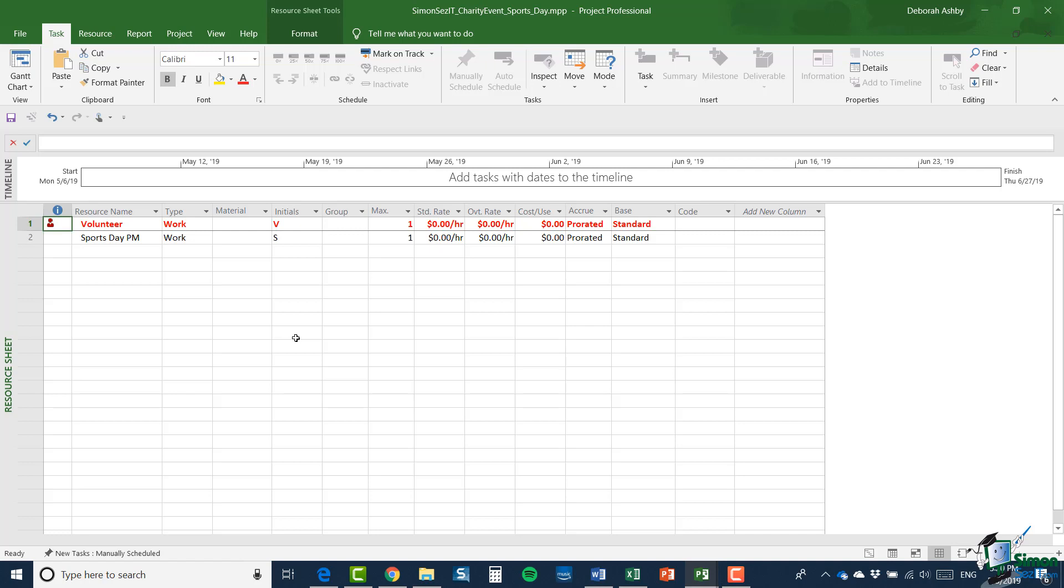Now, in fact, there's an even bigger problem here with the resource because although I now have two projects and they each have, for instance, a sports day PM resource, these sports day PM resources are completely different resources. And even though each of them has a resource called sports day PM, obviously that resource name is the same on both resource sheets. So as far as Project 2019 is concerned, those are completely different resources.